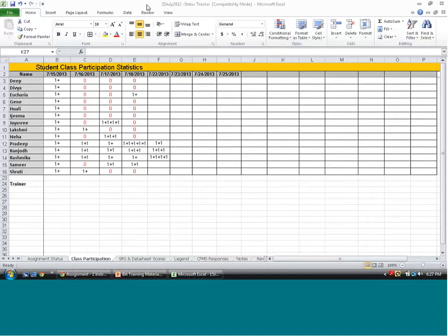organization or certified organization. I will present the complete requirements to the manager that has the highest authority to decide what requirements can be used on the project. So if it's a functional organization, I will report to the functional manager the two competing requirements, and the functional manager will have to decide which requirements will be used on the project.